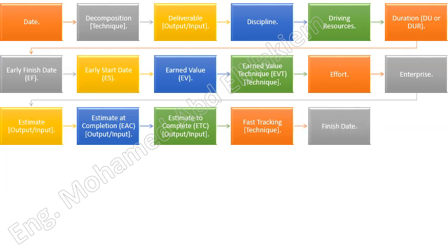Finish date. A point in time associated with a schedule activity's completion. Usually qualified by one of the following: actual, baseline, current, early, estimated, late, planned, scheduled, or target. Finish not earlier than. A schedule constraint placed on the schedule activity that affects when a schedule activity can be scheduled and is usually in the form of a fixed imposed date. A finish not earlier than constraint prevents the activity from being scheduled to finish earlier than the imposed date. Not earlier than constraints impact only the forward pass calculation and hence the early dates of a schedule activity.